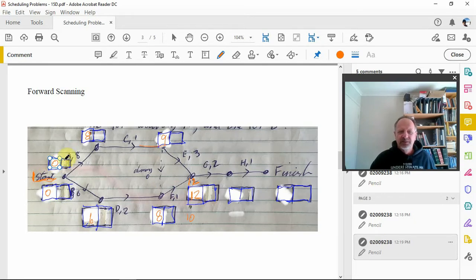All right? And it's determined by this longest time around here. We can go around there in 10 days, but you can't start G till you get this stuff, which is 12 days. So that's all right.